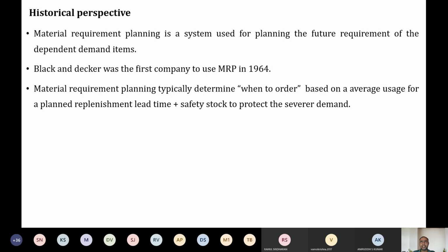Say for example, today's date is 19th. That means on the 9th you should have ordered the product. Okay, so that's how we are going to take this. So 10 days before the manufacturing of the car, you should order that particular product.